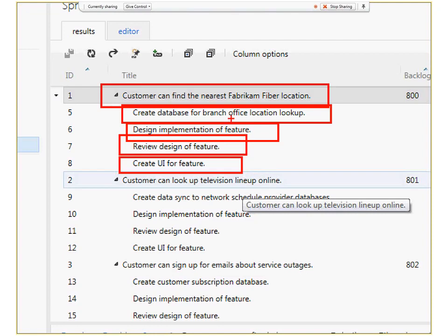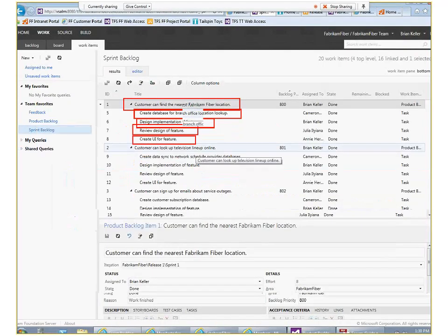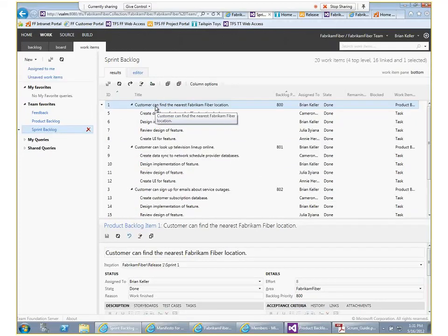So each of those requirements, or PBIs in Scrum parlance, should be independent from one another, and they should be able to be rolled out independently. Now, there is an acronym that's used quite often, and it's called INVEST. Each user story, or PBI for that matter, if it represents a requirement, should follow INVEST. INVEST stands for, it should be independent from one another.